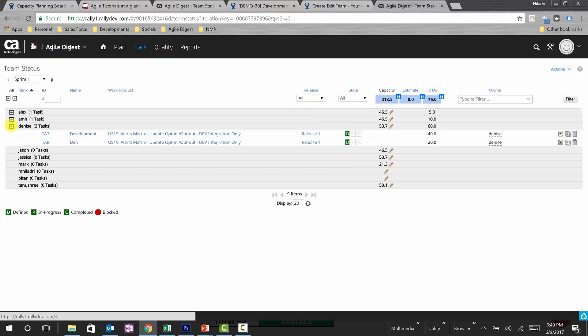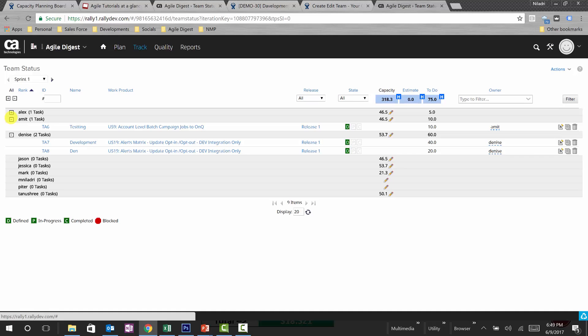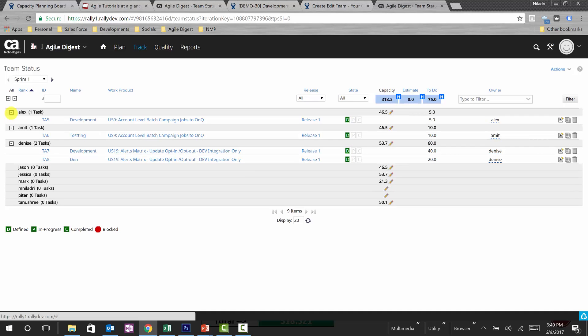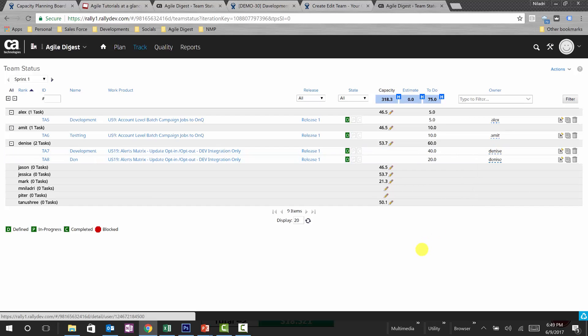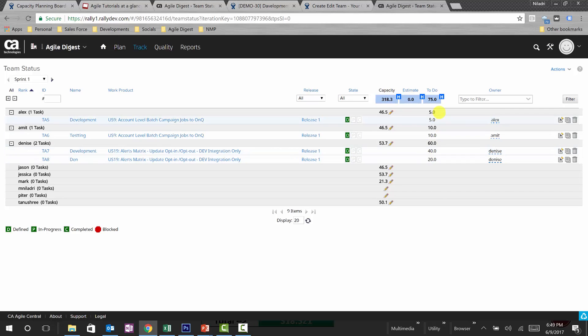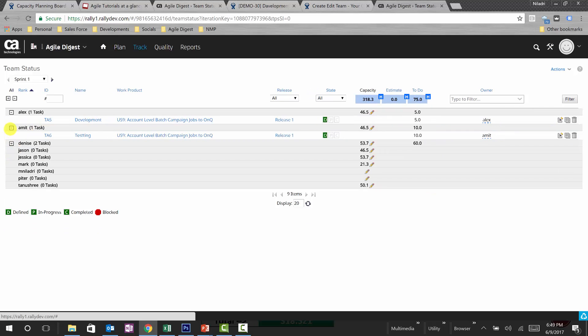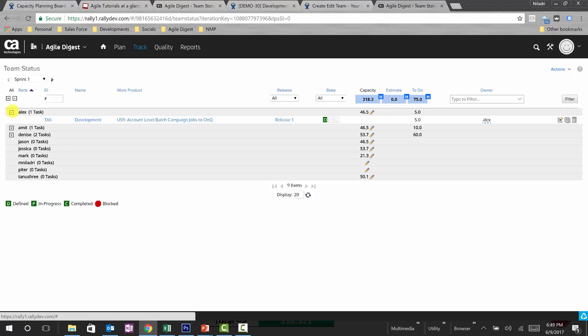If any value is more than the capacity, it's not showing in red, but it's showing in this way. You can actually see how this 60 came up in your capacity and you can actually take a decision: who has bandwidth and how you can change that task from here to that particular person. I think that's, you understood how you can make plan your capacity.